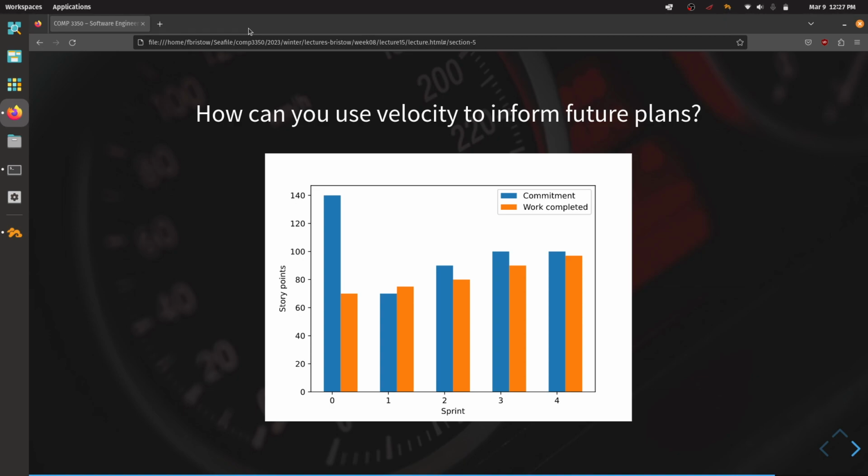All right, so I'm just going to project on you here. I think that this is a good looking velocity chart. It's terrible at the beginning and then it slowly starts to stabilize. The person that's building this plan that is generating this specific velocity chart is making observations. Okay, well, last time we did this, we were actually able to get this much work done. This commitment here might actually just be that. Like, that might be it. Just like copy and paste.